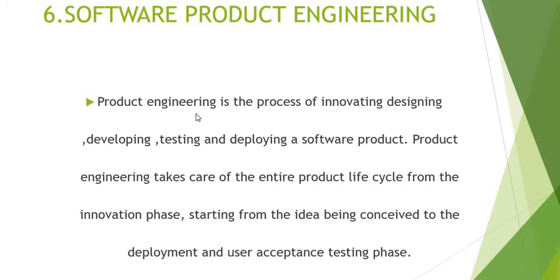When changes are approved, affected software work products, plans, commitments, processes and activities are revised to reflect the approved changes.